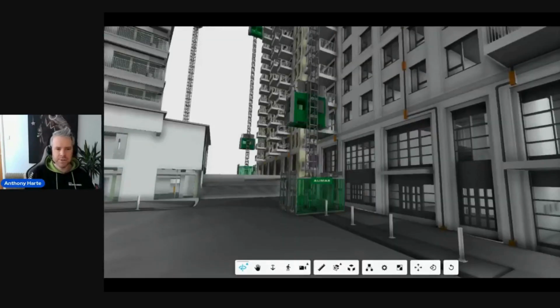And there's various different uses then of the model. So here we've got an example of one of the high rises we're working on at the moment, and we're also now looking at the hoists and cranes as well within this development. So this is becoming really useful for this particular client to make sure that the crane lifts are suitable. So if you think of content, sometimes we just think of buildings, but actually content can expand into temporary logistics. It could be the bollards outside, or the traffic management system, or curbs and things like that. So it really expands not just as building elements, but also outside of that in terms of site logistics as well.